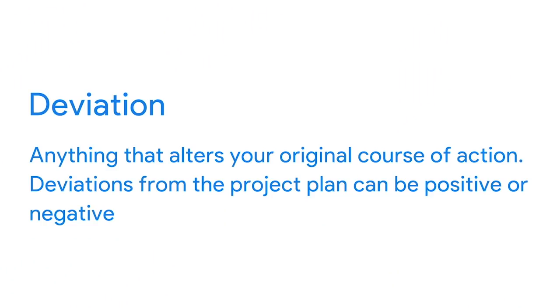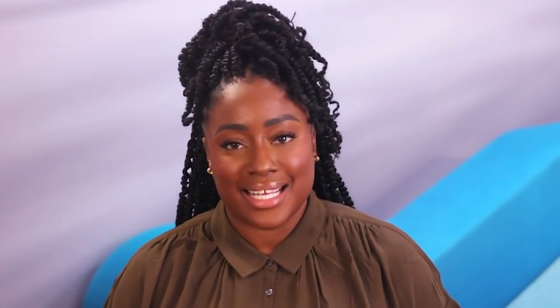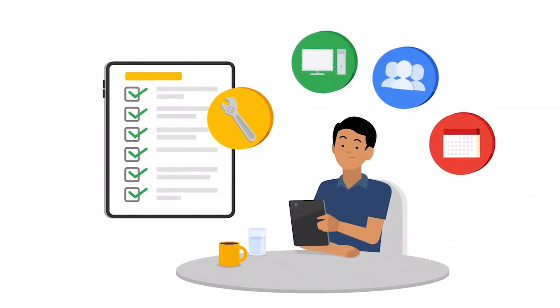Measuring project performance regularly to identify deviations from the project plan can help ensure that the project stays on track. A deviation is anything that alters your original course of action. Deviations from the project plan can be positive or negative. Are you ahead of schedule because a technical problem is less complex than you estimated? Thumbs up. Did a natural disaster shut down your testing team? Big thumbs down. Both of these are examples of deviations, and they're also examples of why tracking is such a crucial part of your role during the project execution phase. Tracking makes key project information transparent, and transparency is essential for accurate decision making.